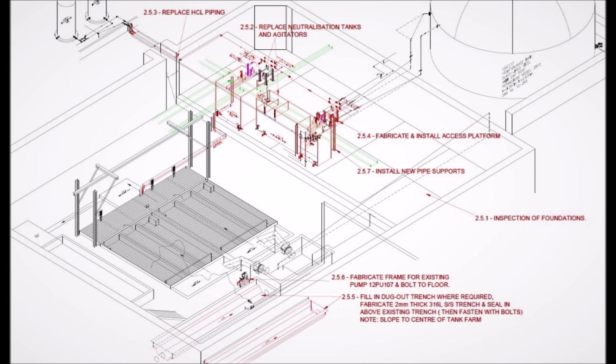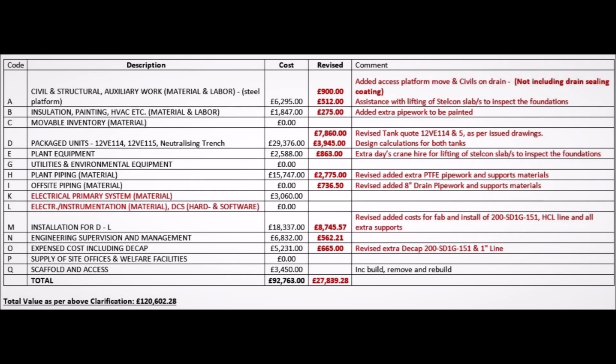These additional requirements were caught after the contractor had already submitted the cost estimate, but before contract award, so the cost was revised by the contractor, showing an increase from $93,000 to $121,000. These changes would have been identified later, but by that time the delays and additional cost to resolve these would have pushed this cost even higher, as the contractor would have set the wheels in motion for the materials on top of the management of these variations.